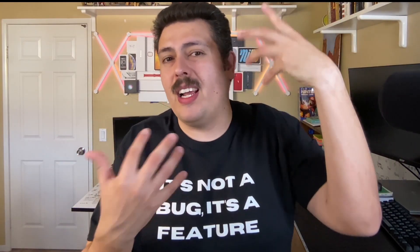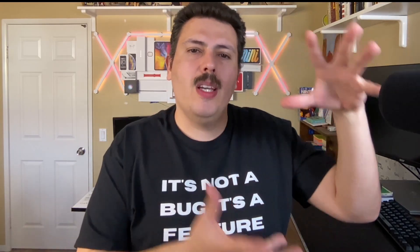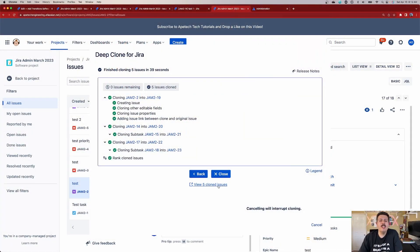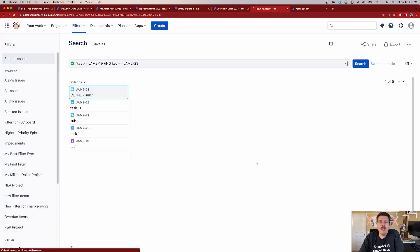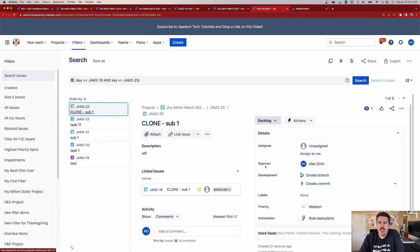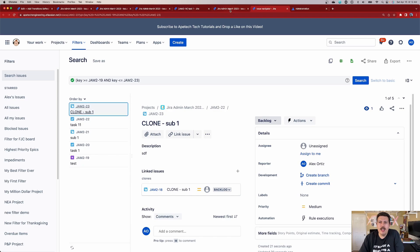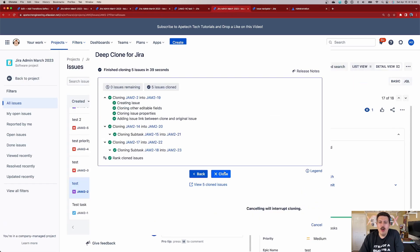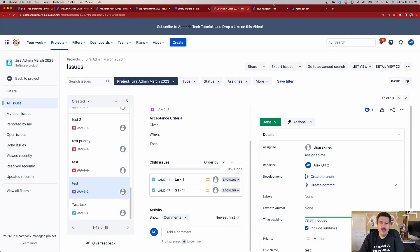What I really like though, is that it's preserving all the relationships, all the field information, and you're basically able to carbon copy. So if you organize all your issues and epics, and now you want to take that and basically repeat that work for like another phase or another milestone, you can just carbon copy all this stuff rather than sitting there and manually having to recreate everything. Once you're done, you can click on this view all five issues. It'll show you a JQL of everything that got done, or you can just hit close and you're done. You've successfully cloned everything. And this time we preserved the entire linkage of all the issues.